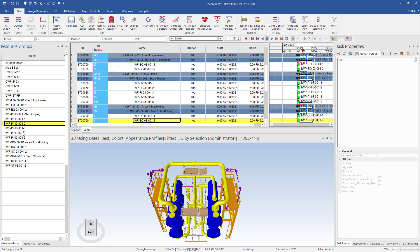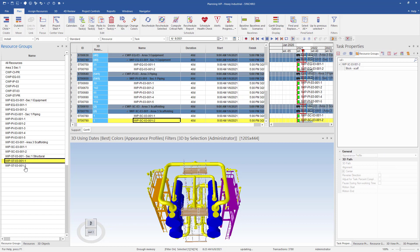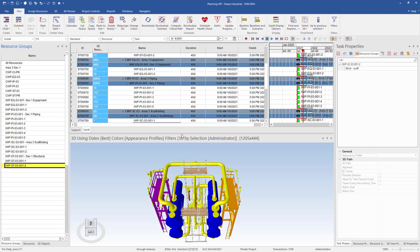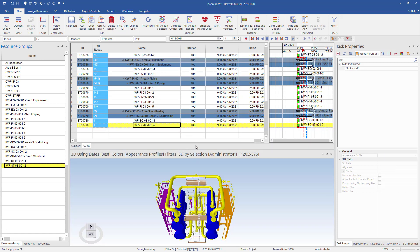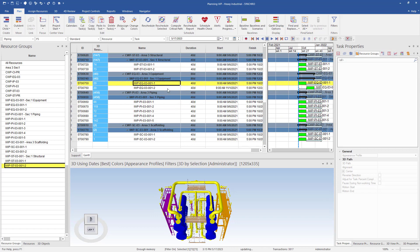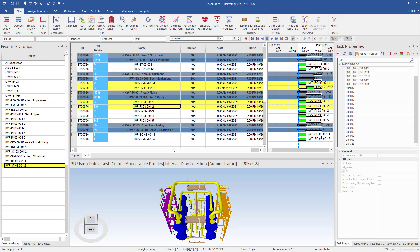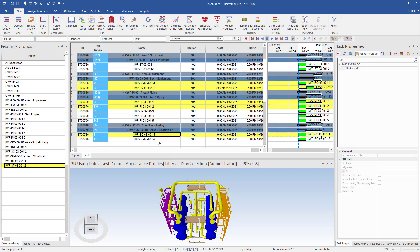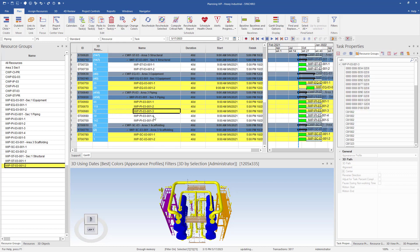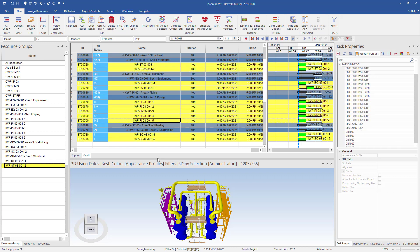If everything looks good, we can start to link our tasks in the proper sequence. To do this, simply hold CTRL on the keyboard and select the tasks in the order required. We will need the exchangers installed first, then we can install the two piping packages at the bottom of the exchangers. Once those are installed, we can build the scaffold needed for the upper piping and get the two upper piping packages installed. Next, we can install the structures beside both exchangers and finish up the last piping package.